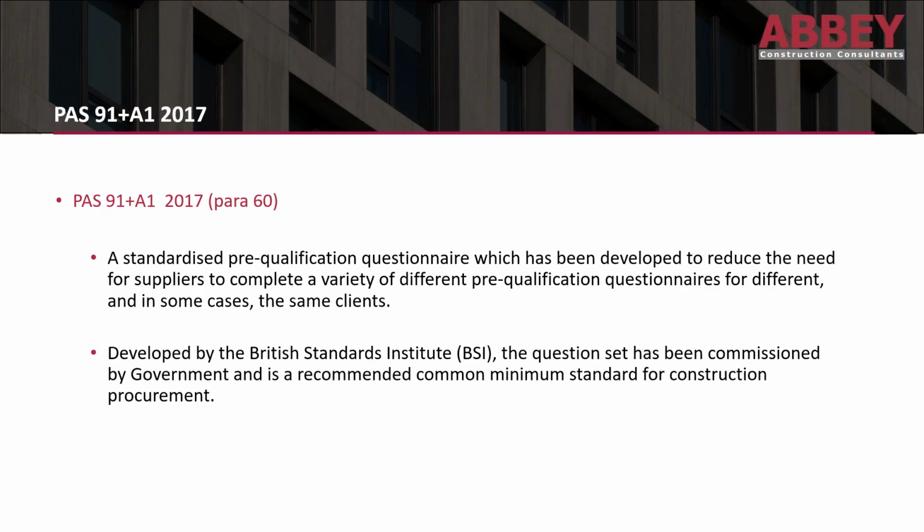I've also popped on there PAS 91 plus A1 to 2017, because this document sets out a standardised pre-qualification questionnaire which has been developed to reduce the need for suppliers to complete a variety of different pre-qualifications.